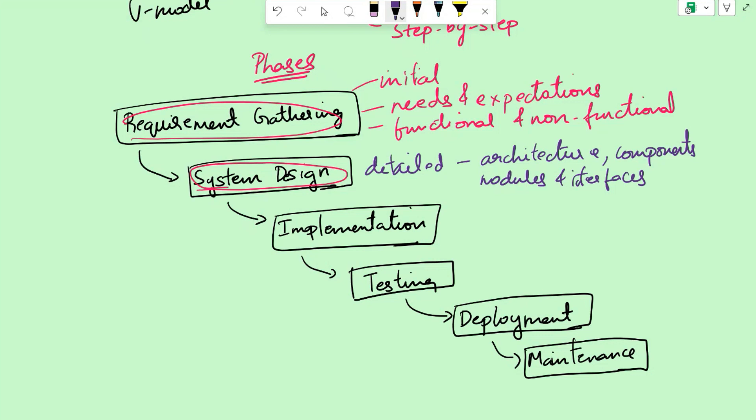For instance, in the e-commerce website example that we discussed before, the system design phase would outline the database structure, user interface layouts, and interaction between various components.